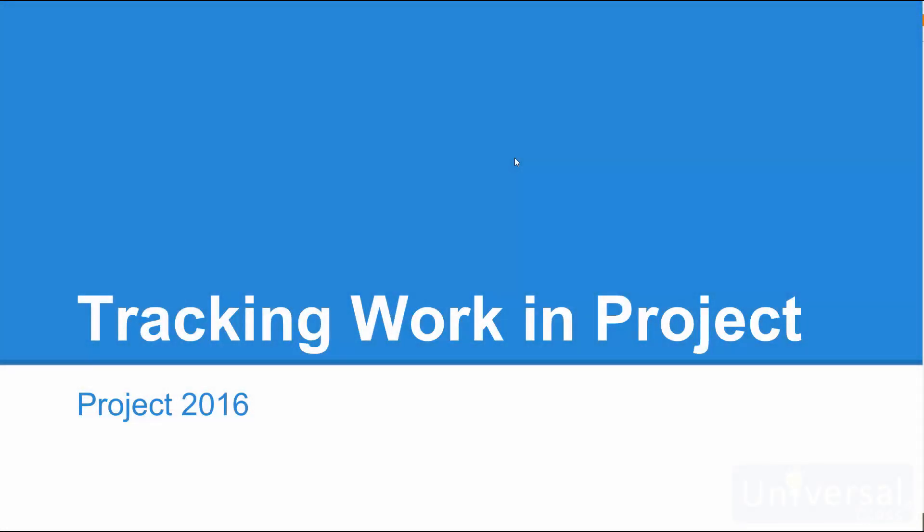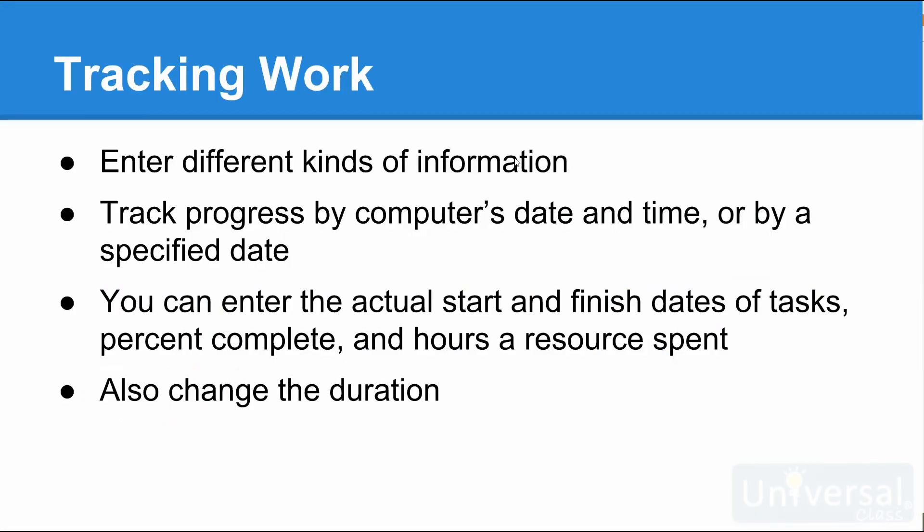Tracking work in Project 2016. When you want to track the progress being made on a project, you must enter different kinds of information. You must tell Project 2016 when you want to track progress. You can track by your computer's current date and time, or by a specified date, such as the end of the month.